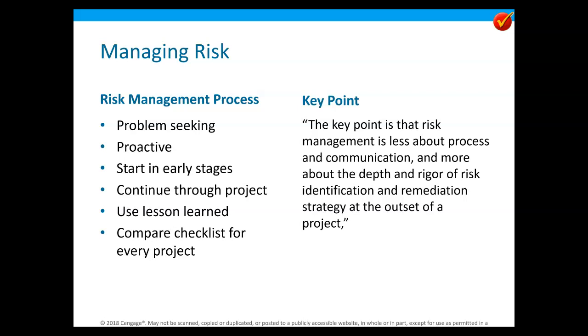And we start at the beginning. So we start looking at it in terms of kind of that desktop planning, what could happen. We continue it all the way through the project because sometimes things change. And we go, oh, I hadn't even thought about that as a risk. So those lessons learned. And then when we do another project, now we have that inventory of things that can go wrong.